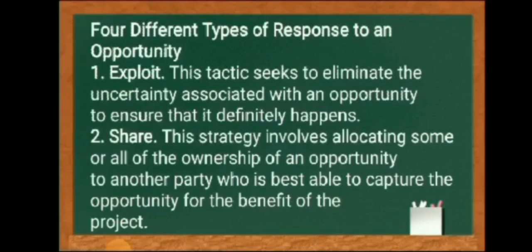There are four different types of response to an opportunity. Number one, exploit. This tactic seeks to eliminate the uncertainty associated with an opportunity to ensure that it definitely happens.